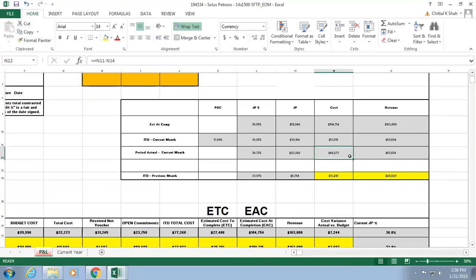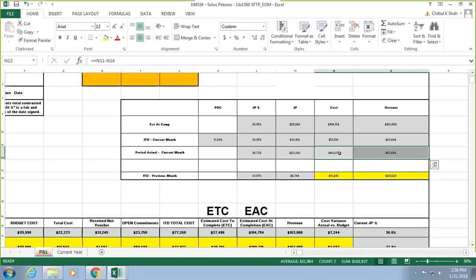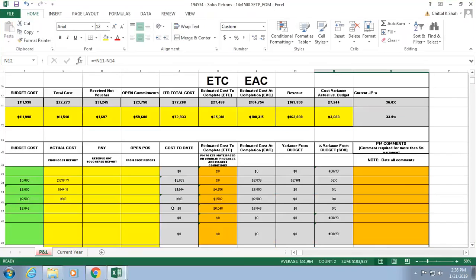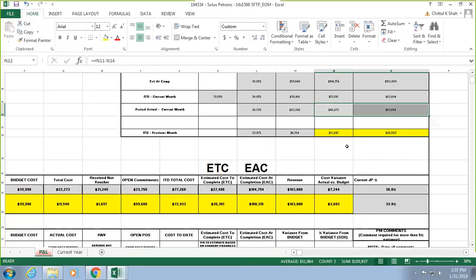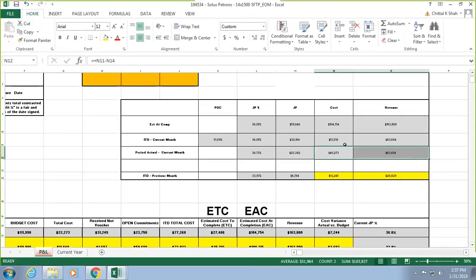So these two columns, or these two cells, are important, because that's the information you take and transpose every month to the second sheet, because that's your actuals. Enrique won't go and do that, because once we adjust the ETC, that number changes. Yeah, that's correct.